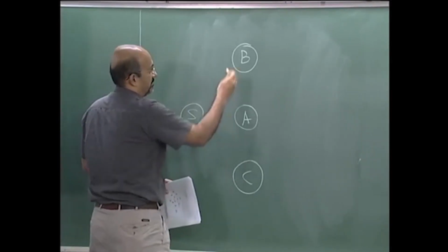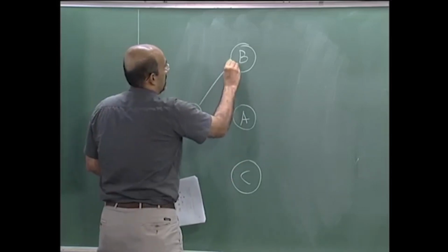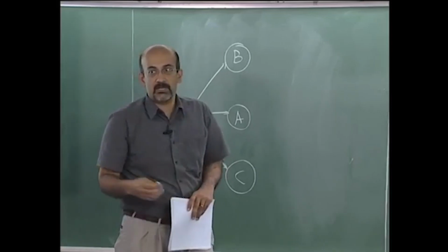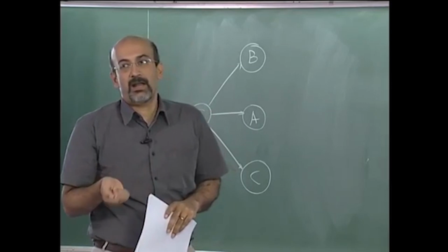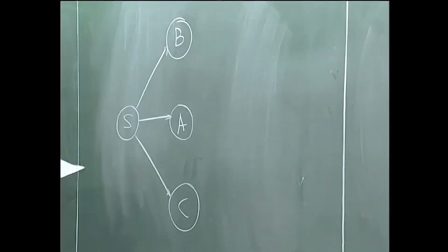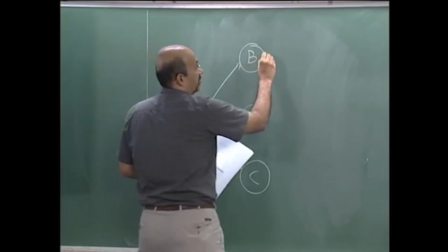These might be physical activities, so it is always good to put a start, which might be a zero duration activity, the kind of dummy which you will have in AON. Remember, AOA had other kinds of dummy requirements for dummy activities. This is the only kind of dummy activity you will have for AON.